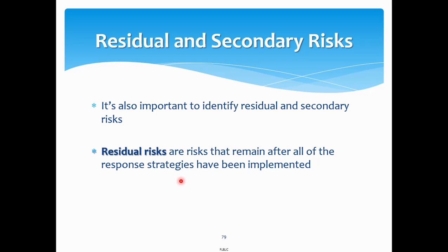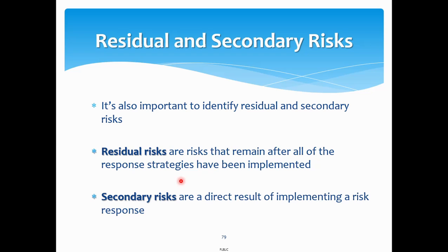Say because of the wedding of that person, the software developer, you are recruiting a replacement. Even after that, there can be a residual risk of a certain amount. Although you recruit and train him, there is a risk of that person not being up to the mark of the previous person that you had. So there is a residual risk, a remaining risk there.